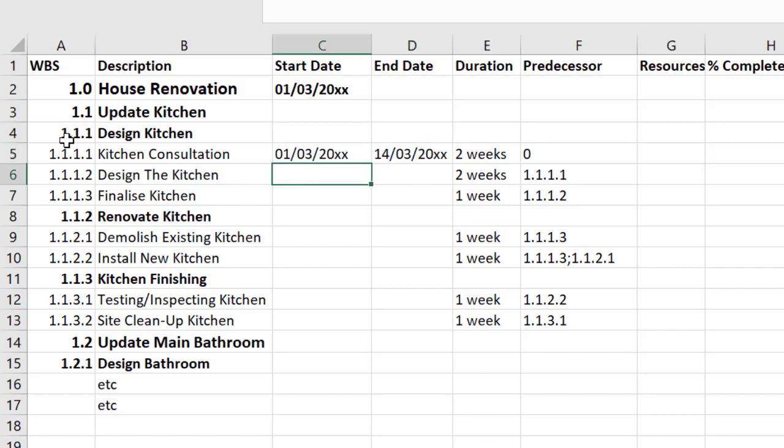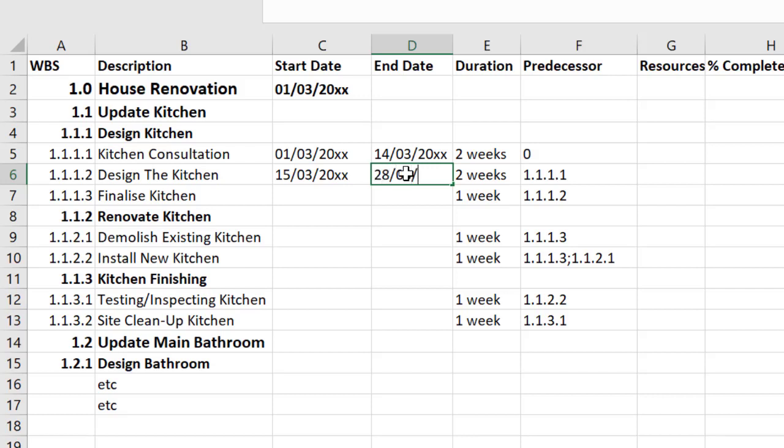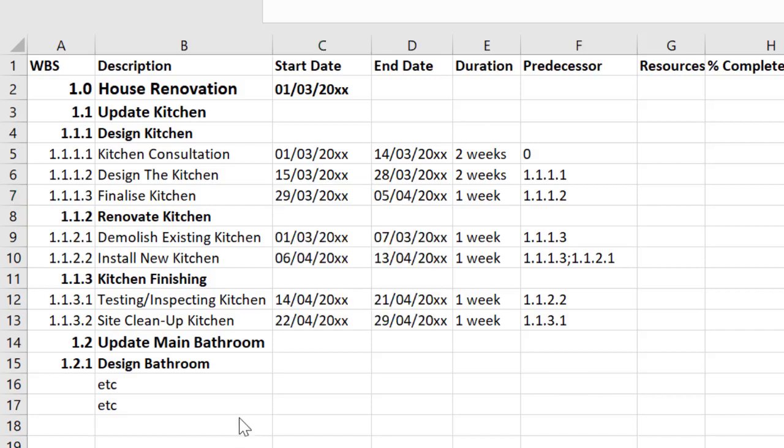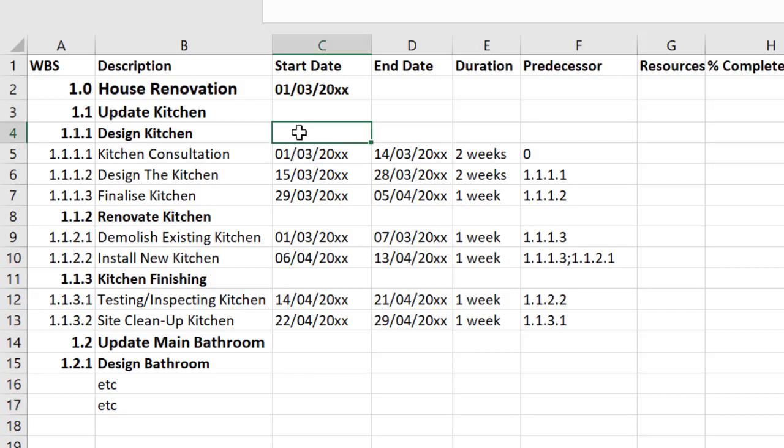There's a dependency here so I know that this next task is going to have to start the day after the previous task has finished. That's in there. Again it's going to take two weeks pushing that out to the 28th. So we use the same process going through looking at the dependencies and working the dates out from there. And here it is after I've entered all the start and end dates or start and finish dates. So notice that none of these bold work packages or deliverables have been completed yet. However now that we have all these lower level dates in it's much easier to fill the top ones out.